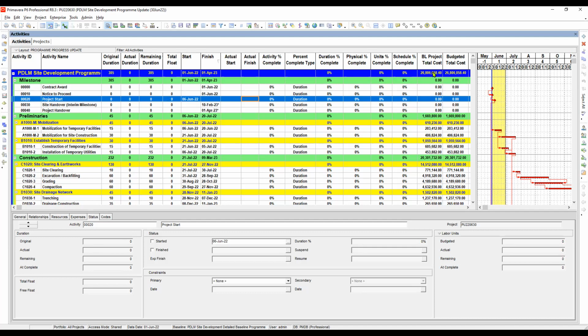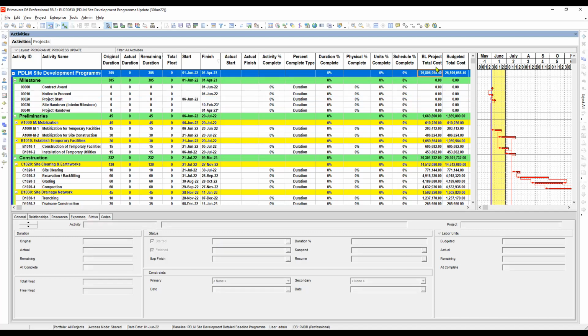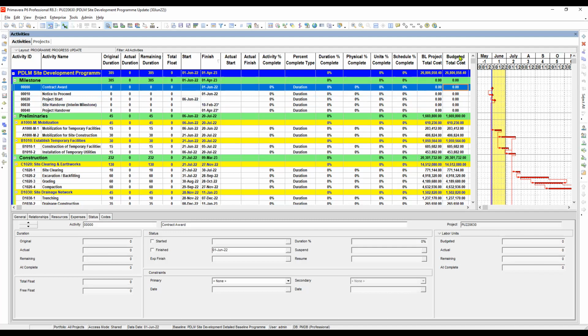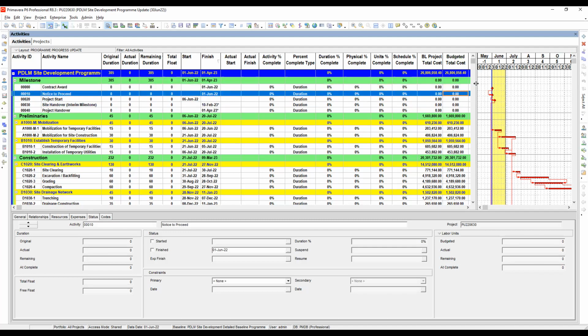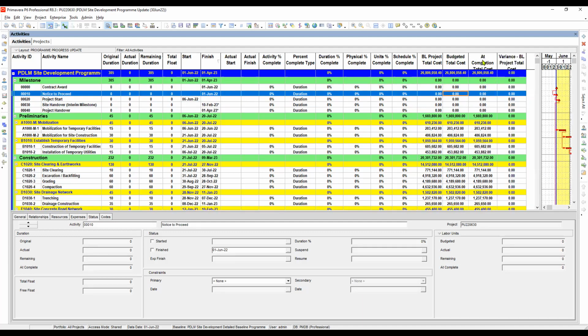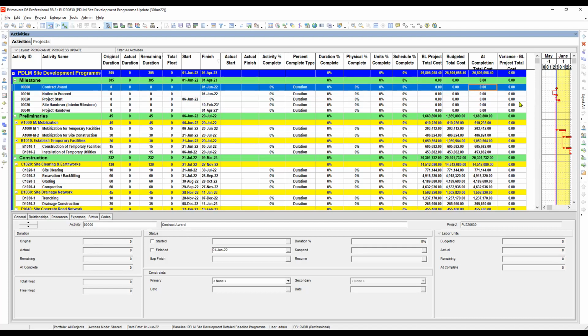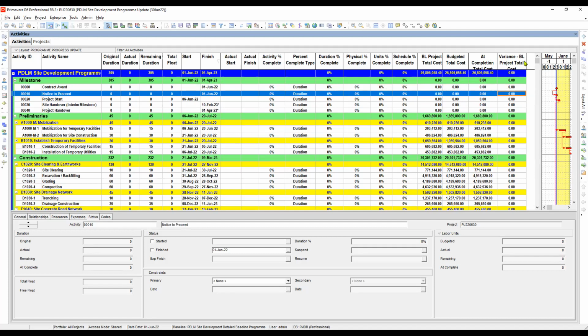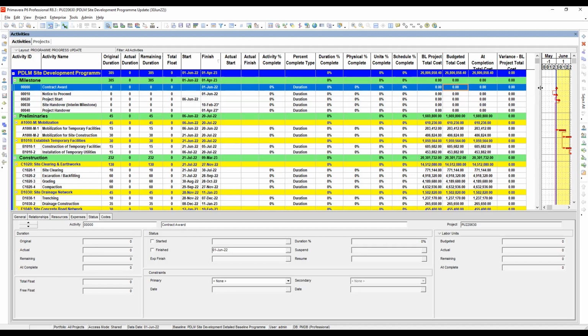And here, since we have our baseline schedule, we assign it as a baseline to our current program update schedule. So it is shown here. For now, they have the same budgeted total cost as the current program. So this is our baseline and this is our current. I also show it here, but I think I need to explain this in detail later. I just show it here for my reference, whether our work is going well or not.